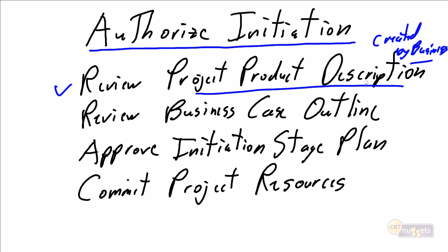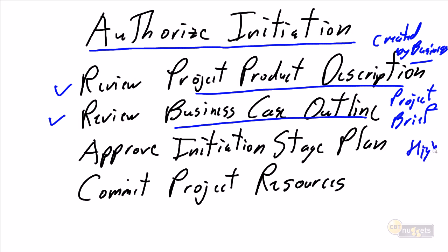So they're going to review the product description and say, yes, this makes sense. I agree with you, business. I agree with Steve's very preliminary assessment of how we're going to solve this. Yes, let's proceed. And part of doing that is going to review the business case outline or the project brief, the project charter if we're going to use some other non-Prince2 terms. But this is where we're going to review that high level plan. And the key thing to remember at this point in time is that it's high level, it's preliminary.